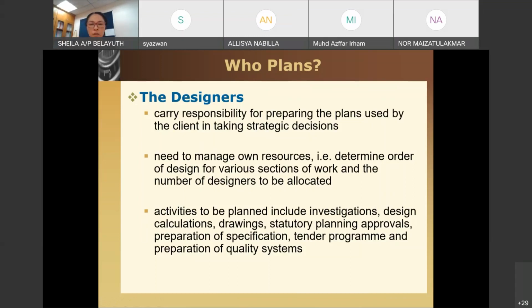So you needed to go to different agencies to attain the approval. But now, normally, it is submitted as one entire document at the local council itself. Whether it's Majlis Bandaraya or Majlis Daerah, it's a one-stop center. Basically, submit there and they will delegate and so on. Anyhow, this needs to be attained before anything.